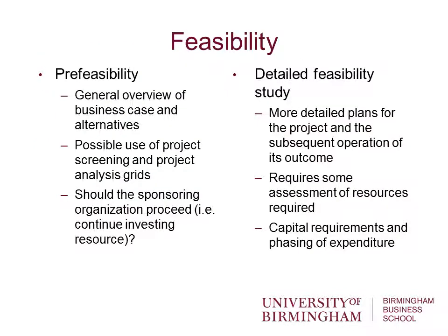Okay, so I mentioned feasibility. How do we go about feasibility? It's normally multiple stages. So there'll be a pre-feasibility stage, at the very early stage when we have very little information. At this point, the organisation will look to have a general overview, the business case and the different alternatives. As I said earlier, does a project even need to be used? They might use project screening and project analysis grids, and there's a question the sponsoring organisation will ask itself: